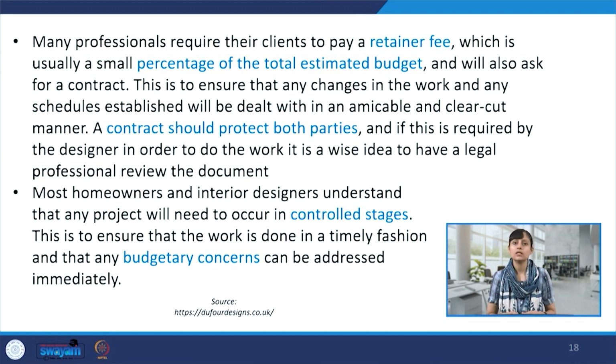So I was talking about a retainer fee, and just gave you a very subtle introduction to that. Many professionals require their client to pay a retainer fee, which is a percentage of the total estimated budget, and it's taken at the start of the project. And it is advisable to put a contract in place, and it protects both parties, and all the terms and conditions are laid down very, very clearly.